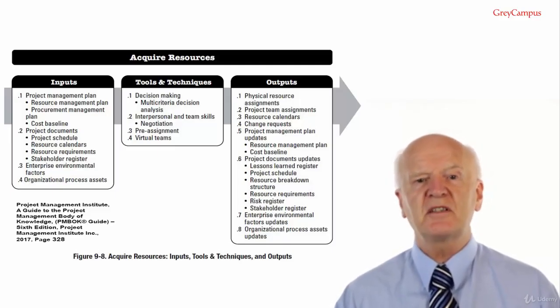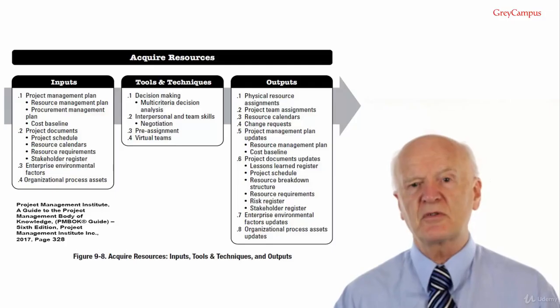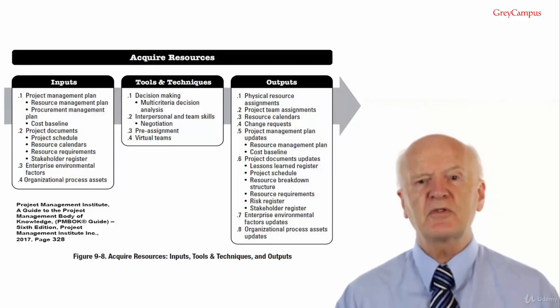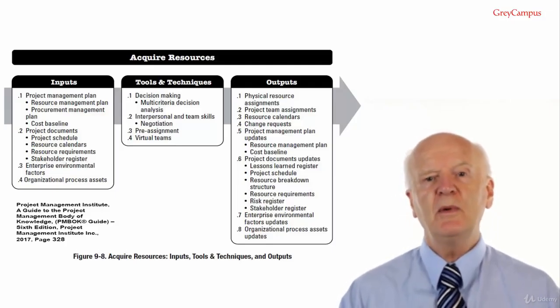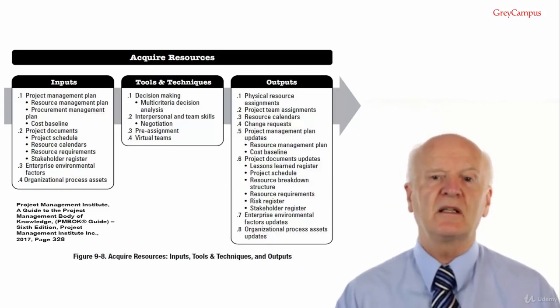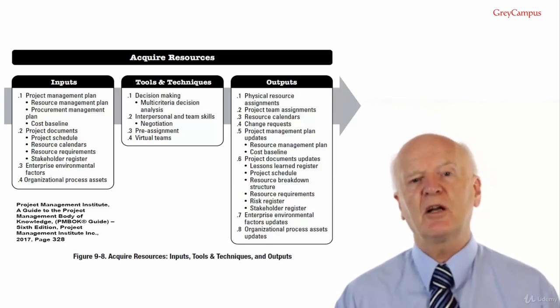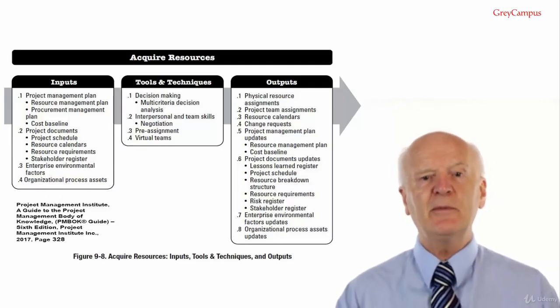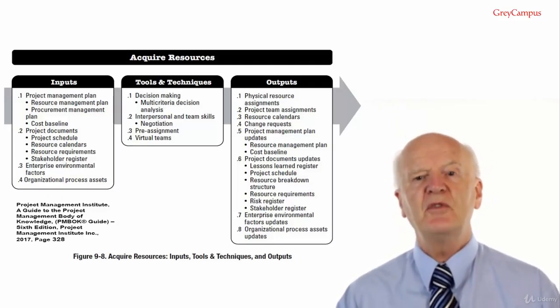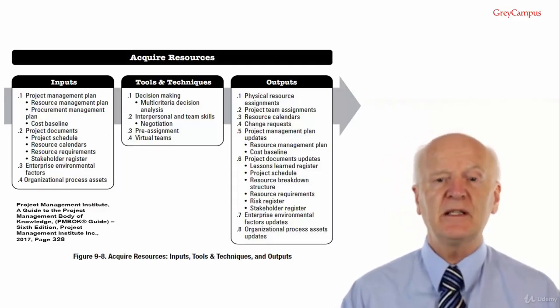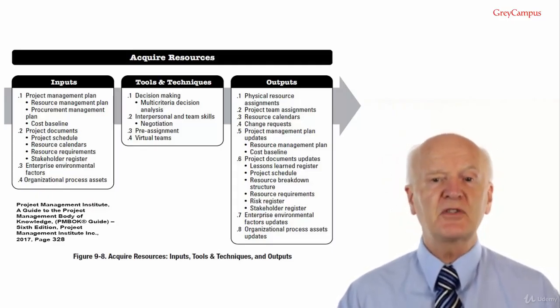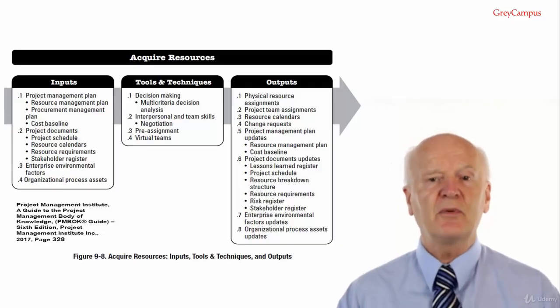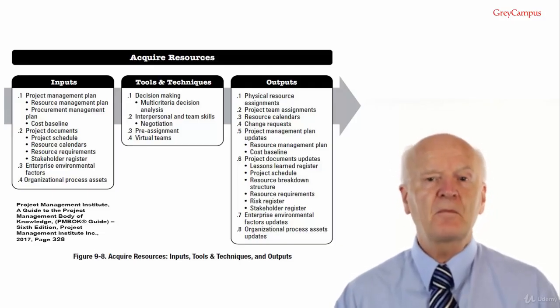Appropriately assign or share scarce or specialised resources. If you have desirable resources allocated to your team, you may be able to do some horse trading. For example, if you have the capacity, offer your specialist to solve a problem for another team, then when your project isn't too busy, you can call in the favour later. And that's a bit like levelling resources, but across different projects with different project managers.